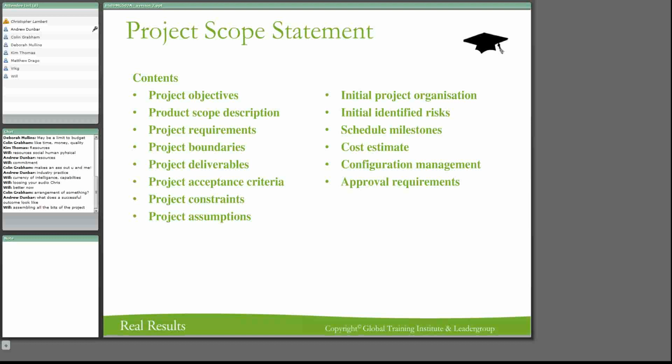So there is a delegation of at what level approval comes. It's obvious that every phase needs to be signed off, and on the phases of a project, it's highly recommended that the client signs off on it, and that the project board, if you've structured it as a board, has an impact on that decision. So those are approval requirements. If those are done up front, you will have a lot fewer problems down the road.